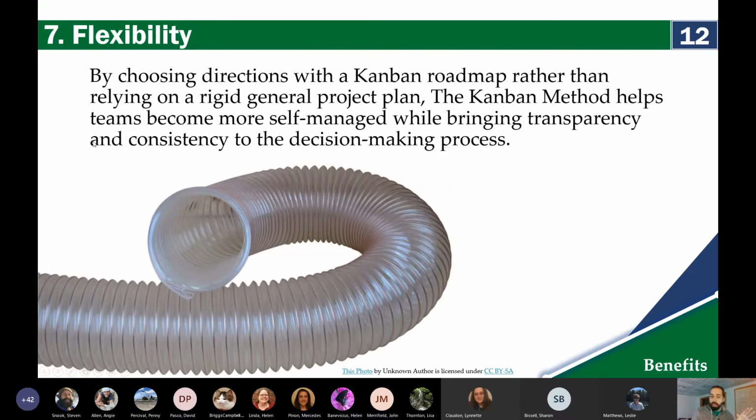So the other nice thing is that it's fairly flexible. I know it seems like a rigid adherence to these categories, but it's not about individual tasks being completed, but about these gates being passed. So how you get to that gate, there's a lot of room there. When you're building your Kanban board, you don't want to build each individual task as a list, but rather you want to try and group tasks by the type of work that's being done.